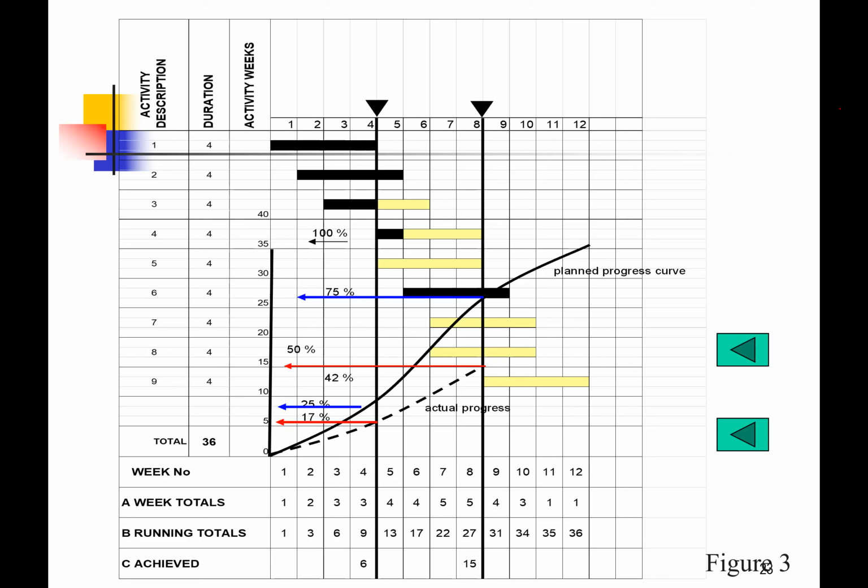I would say the most difficult part about Microsoft Project is doing tracking. In Microsoft Project they use the word tracking, which is basically similar to monitoring. The most difficult thing about using any software is to understand this. To construct a network diagram is very easy once you have all the data. But tracking involves the real things. You need to collect the real information based on what is happening at the construction site, and then input that into the computer, and the computer will automatically give you immediate output.